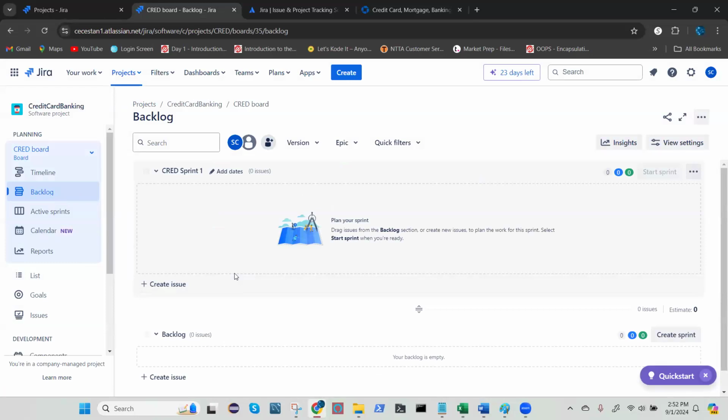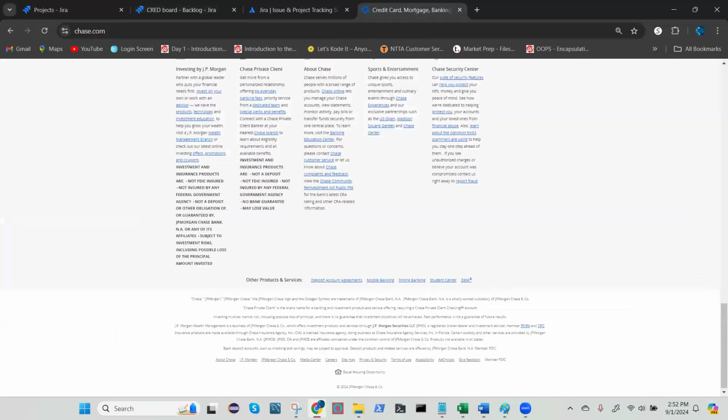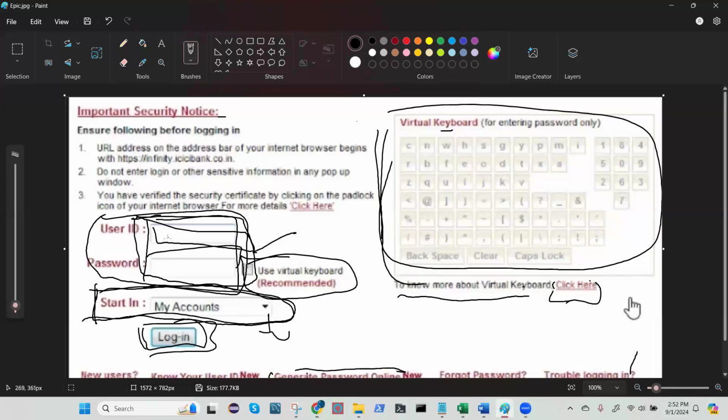Now we have sprint planning. They will have sprints. In sprint planning, we have the product backlog, we have the team's capability and restructuring, and business values. So according to business value, are you going to start picking all these things? Which are you going to pick first? This one. This is the major one in a login screen. Are you going to start picking up footer links?